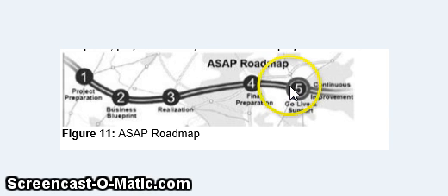And the final stage of the ASAP roadmap is the go live and support phase, where you move from a pre-production environment to a live system. The most important elements include setting up production support, monitoring system transactions, and optimizing overall system performance.